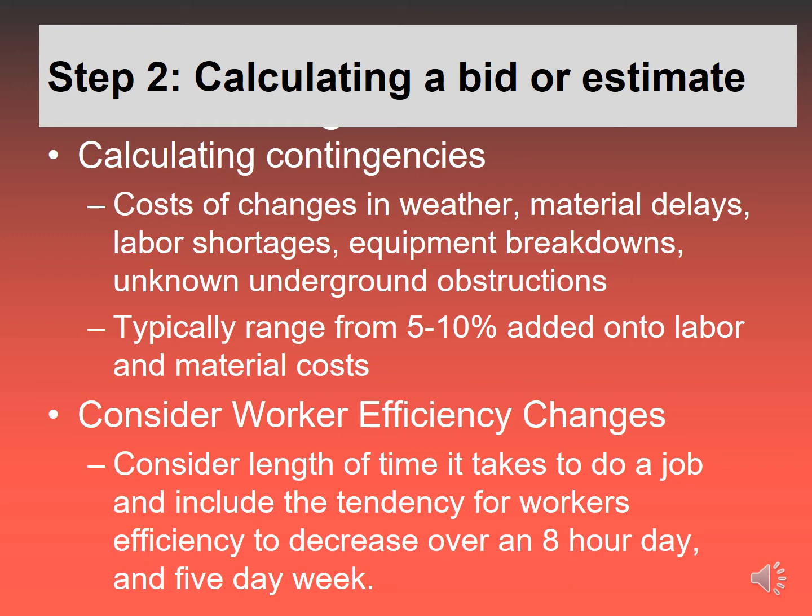And of course, as I mentioned a little bit before, there are always contingencies. The costs will change even if you get all of the materials and even the labor dialed in. You're going to have some things that you just can't account for. People get sick, equipment breaks down, things take longer, you run into underground gas lines or water lines that you didn't know were there and no one else knew were there. Weather can get in the way, a big snowstorm or rain delays it, and then your materials deliveries can also be delayed, which is very common.